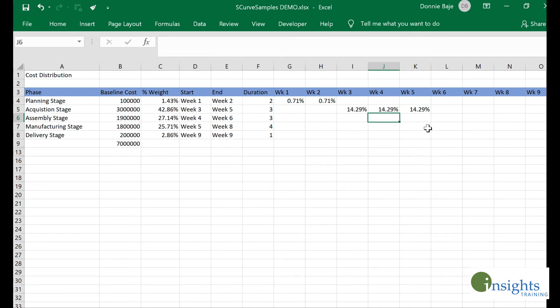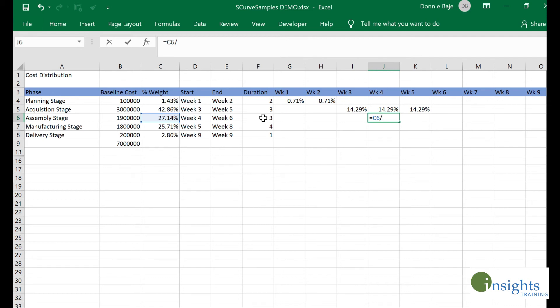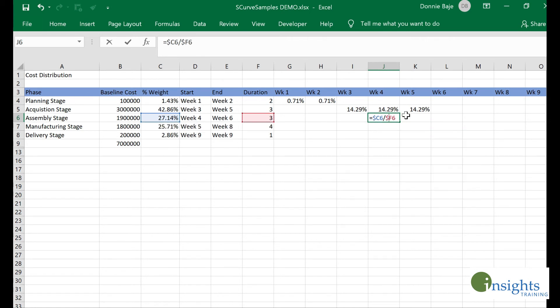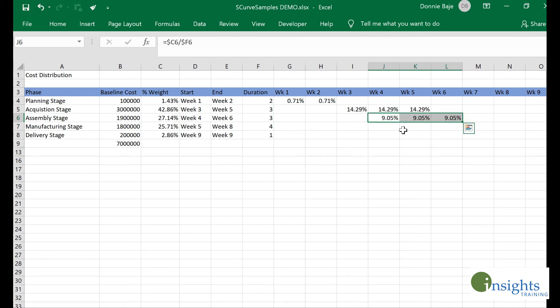Now I'll do the same for the rest. Let me do this: weight divided by duration. This one is for week four to week six. This one is for week five to week eight.